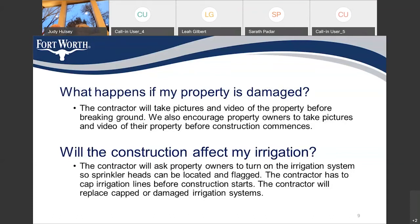Will the construction affect my irrigation? The contractor will ask property owners to turn on the irrigation system so sprinkler heads can be located and flagged. The contractor has to cap irrigation lines before construction starts and will replace capped or damaged irrigation systems. There will be some water meter relocations out of driveways, which will require relocation of the irrigation system controls. The contractor will be responsible for repairing any irrigation systems damaged due to construction.